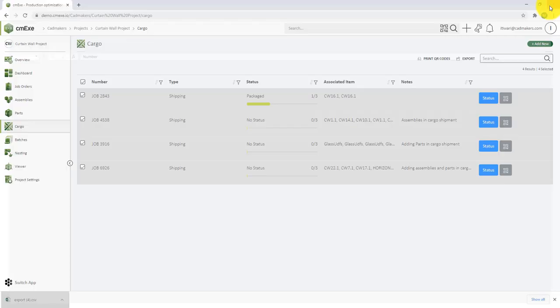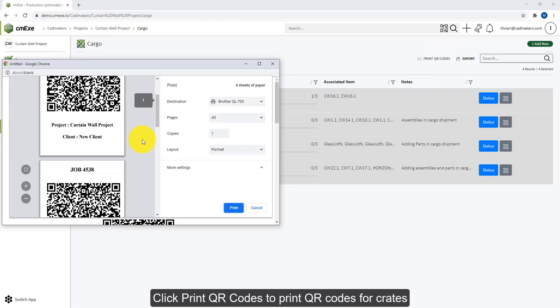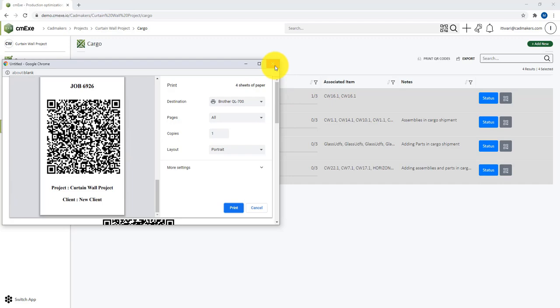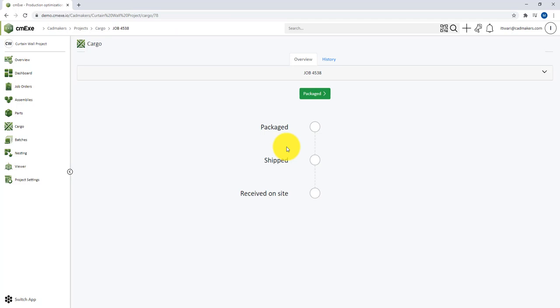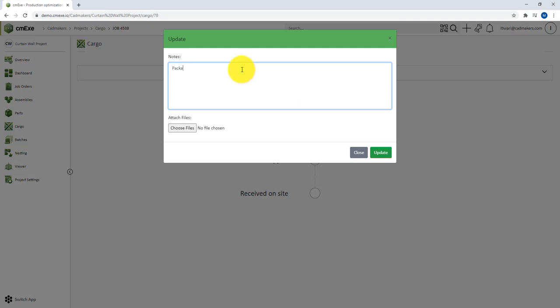Once the QR codes are placed on the respective cargo, users can scan the QR code and come to the status change window. To update the status, simply click on the green button, and that will bring you to the update window. Here you can add notes, you can attach documents which are relevant to the shipment, example permits, and once you're done, you can go ahead and click on the Update button.